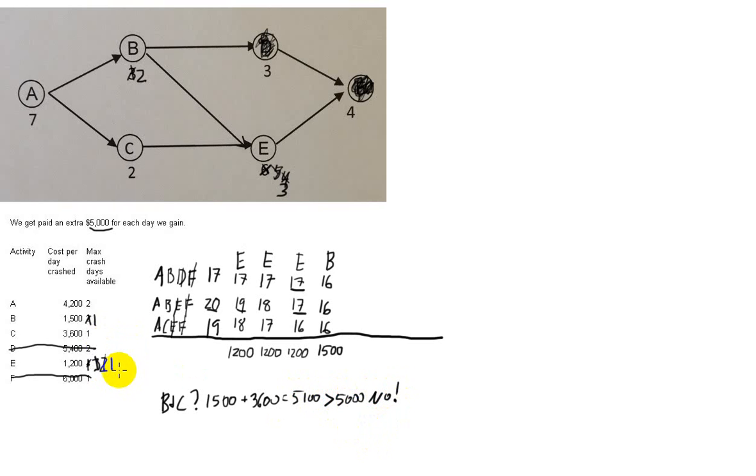It looks like we're done crashing B and C together. The only remaining option is to crash A. So we're going to crash A. And that's going to reduce the time of anything with an A in it. So this is down to 15, this is down to 15, this is down to 15. And the cost of that was 4,200. If you want to keep track, keep running total there. A is down to six days, and we had one day available left that we could crash it.